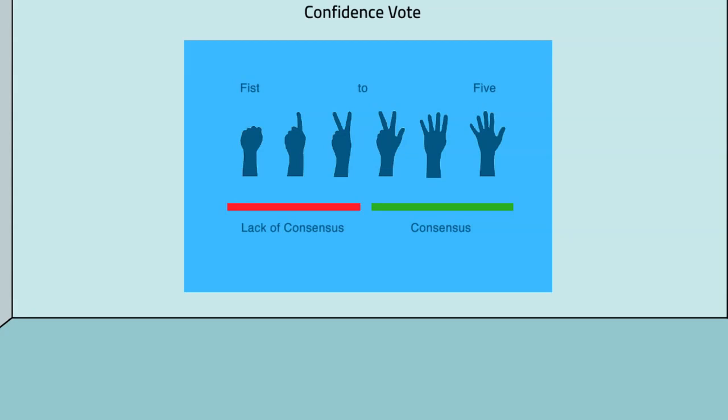So on a countdown or a virtual planning tool, we will essentially say, vote now. Each member will present a number of 0 to 5, or if they can, a fist of 5. If we have zeros, ones, or twos, and this is any individual involved in this event, then we must ask the question, why is there a lack of confidence?